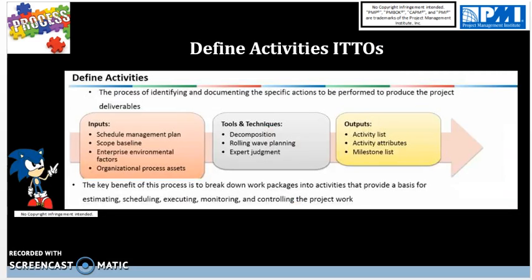The ITTOs — inputs, tools, techniques, and outputs — for Define Activities are as follows. For inputs, we have the Schedule Management Plan and the Scope Baseline. Remember, the Scope Baseline consists of the Scope Statement, WBS, and WBS Dictionary.